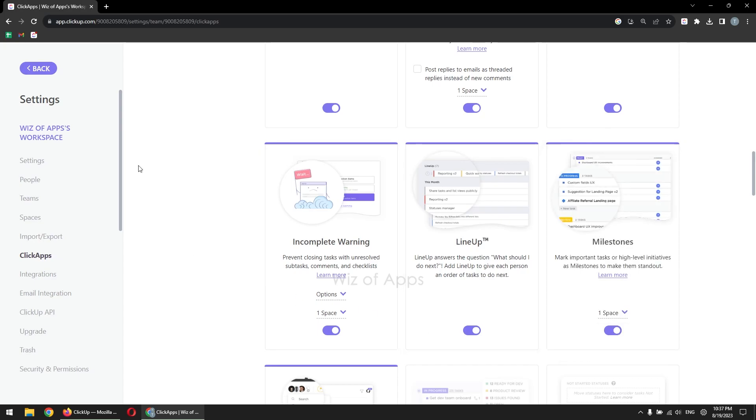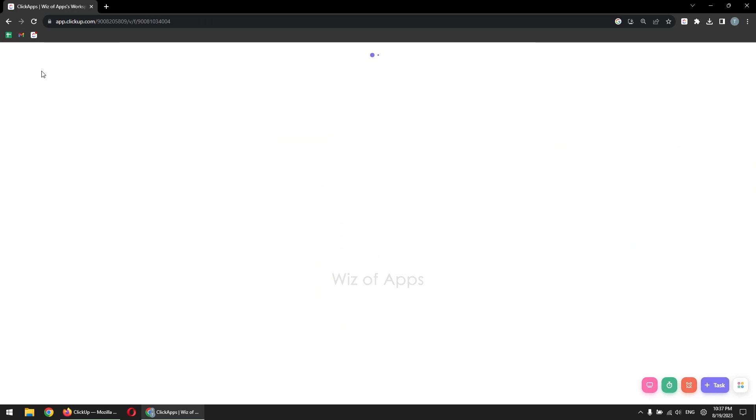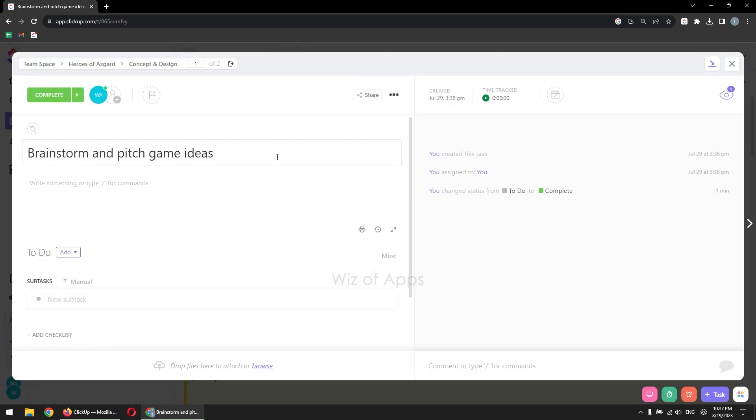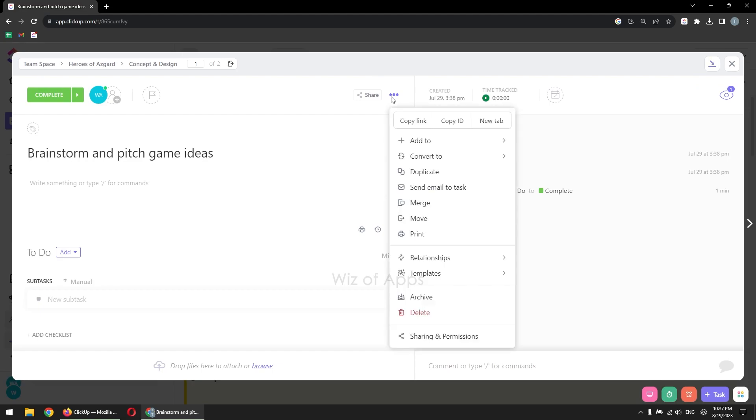Now, to turn a task into a milestone, open the desired task. Click on the ellipsis menu. Select Convert to. Choose Mark as Milestone to transform the task into a milestone effortlessly.